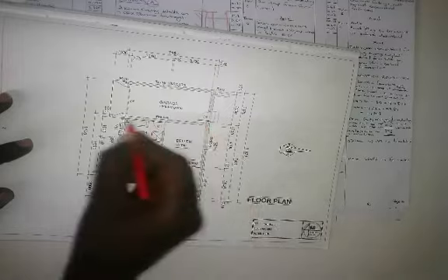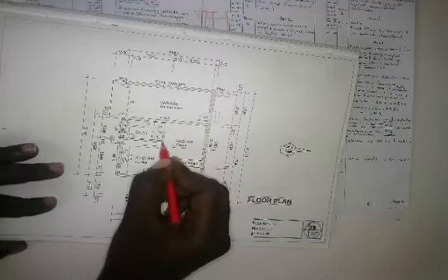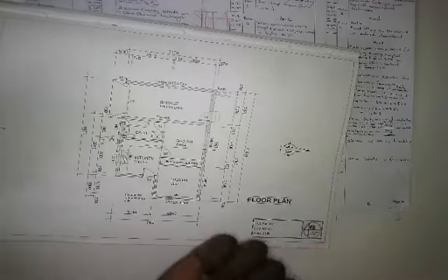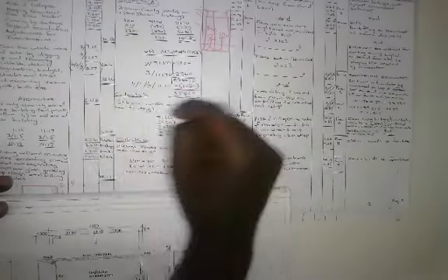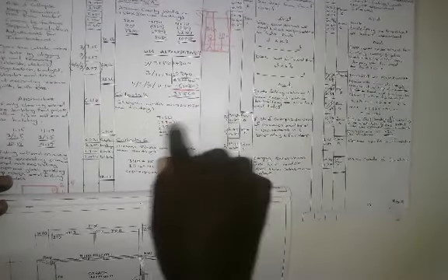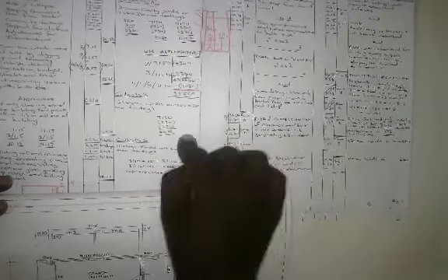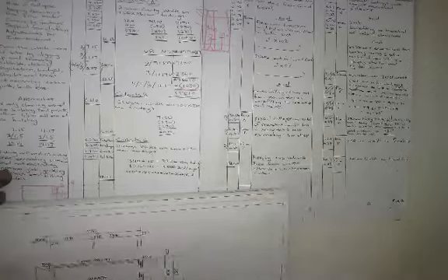Here it is. You must look at the annotation in your drawing. When it has a void, then you know that's a cavity wall. But when it's solid, you know that's a 230 wall, 220 wall. When it's smaller than this, you know that's a 110 wall. Okay, guys, that's fine. So there we have it. It's 6.61. So that's 7150 minus 270 minus 270, 660.